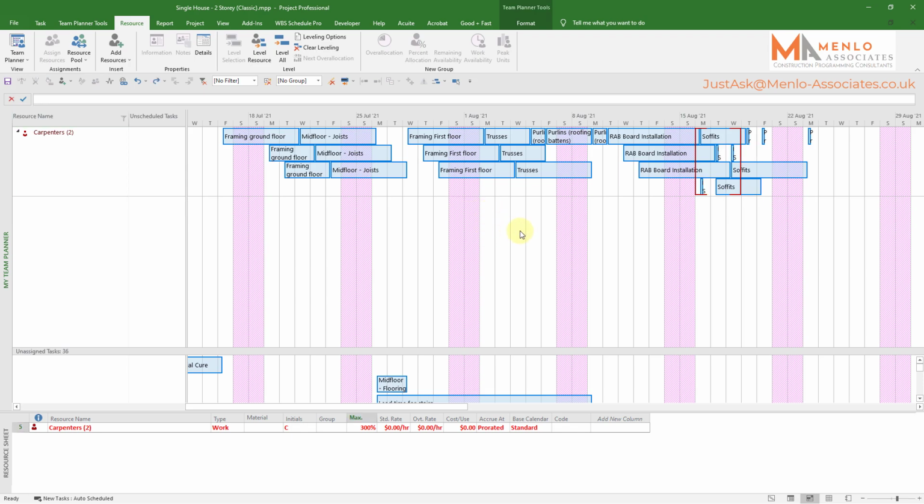Generally, it's a case of working out manually how it can affect it. So you can see here now, this is the first case of over allocation. If I move it out, say, by a day or 2, am I improving things or not? Move that. Needs to move out, say, by another day or another half day. I've managed to fit it in there, and so that's taken away all the over allocation.